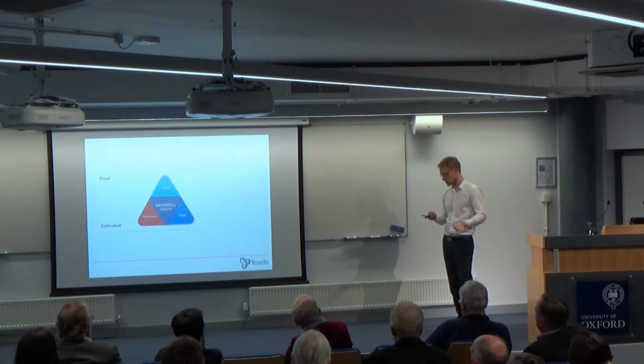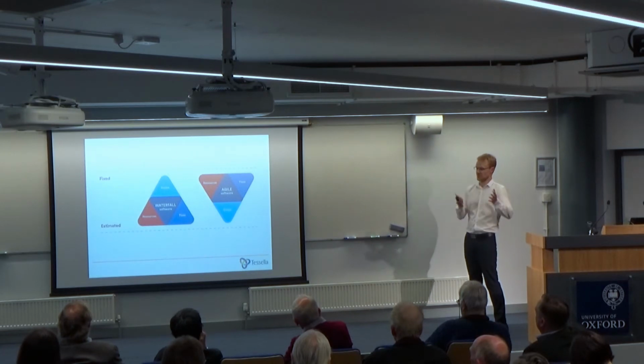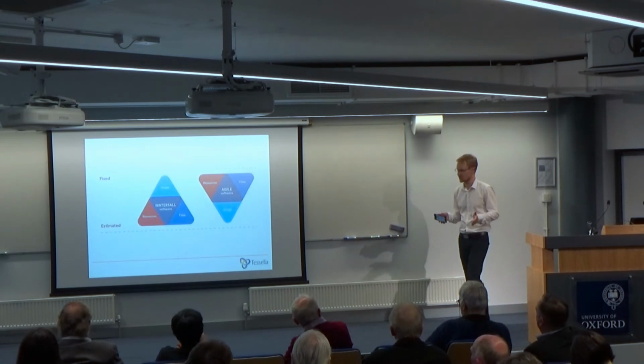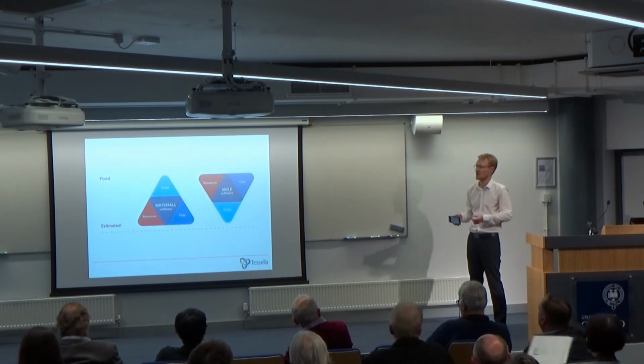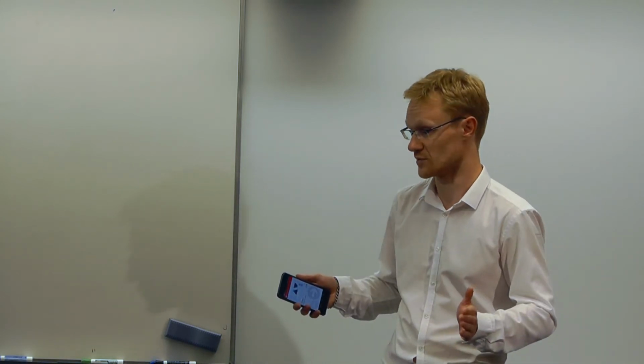In Agile, what we do is we turn that around. We say, well, we've got a team and we've got time, because they probably have a deadline, and the budget will give you that time, because we're paid by how much time it takes to build. So these are actually fixed. Now we take the scope as the variable. We look at what the highest priority stuff is and deliver that. And if we don't get to the end, it doesn't matter, because you've delivered the higher priority first. But it's easy to say and hard to do.